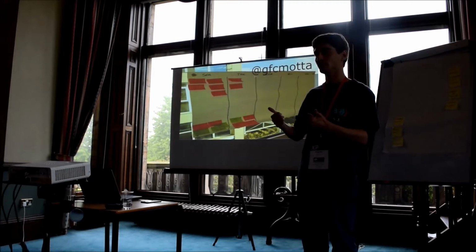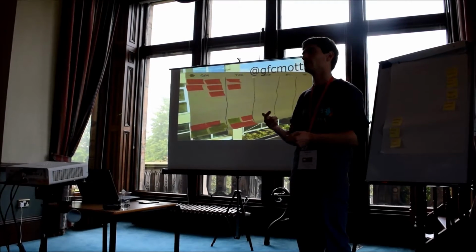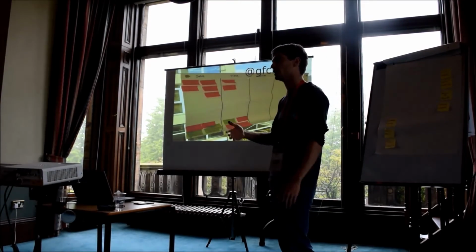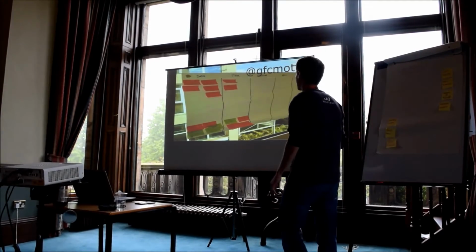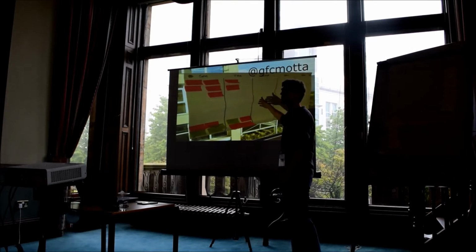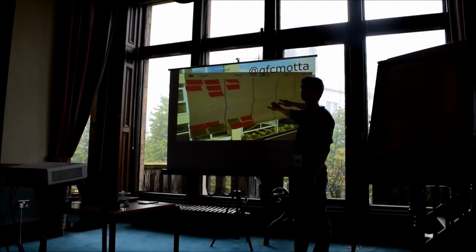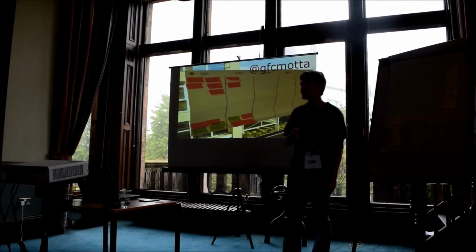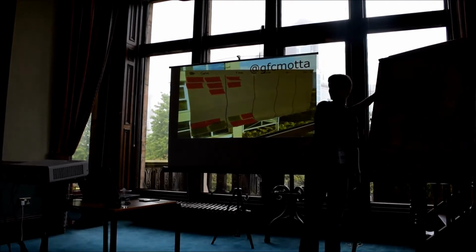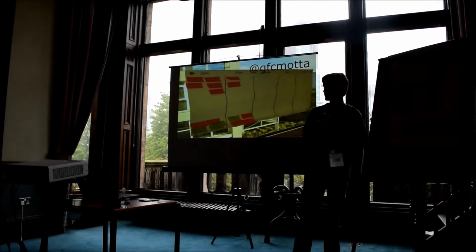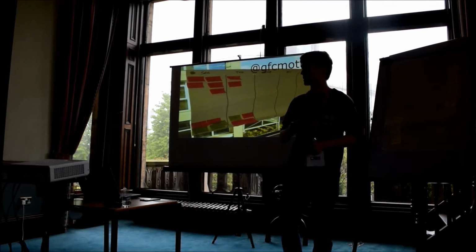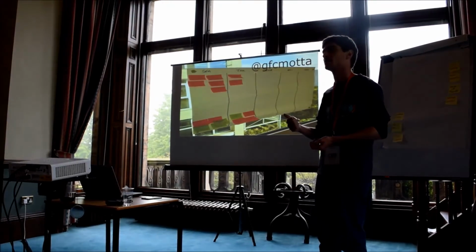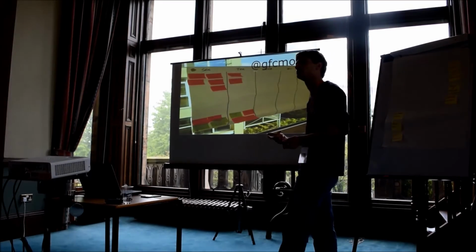And it's good to help people, but we need to understand also the organizational impact that some of these roles generate when they are interrupted. So after a few days, the canvas started not to get any post-its. It's interesting, right? People didn't want to write their names and put on a wall. Yes, I asked for help. They understood that some of the things that they were asking this guy that was really important for the company was not as critical as the other tasks that this guy was doing on a day-to-day basis.